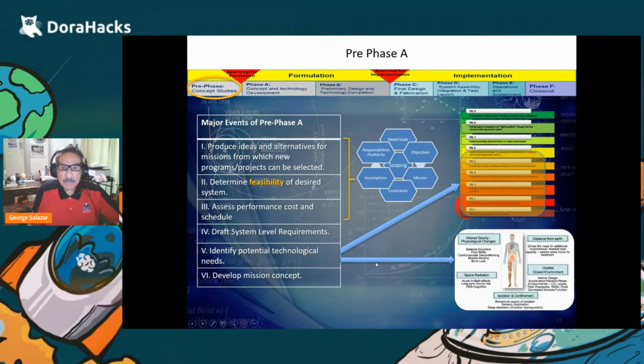So the next phase, and those are actually the key ones that I highlighted right here. And basically, a PDR, and I'll mention this later, is technology readiness level 6. That's basically a control gate as well, as is the maturity of technology as we're developing these systems. And if everything looks good, and the reviews go well, and everybody's hunky dory with what's been presented, they're going to go to phase A.